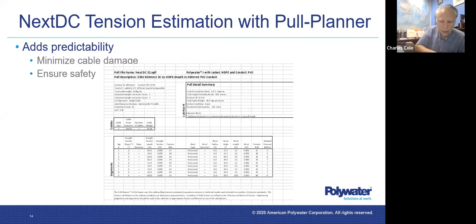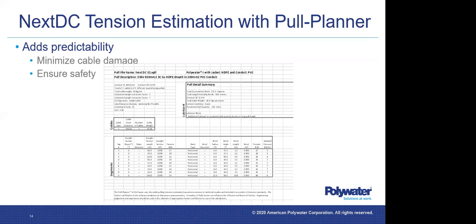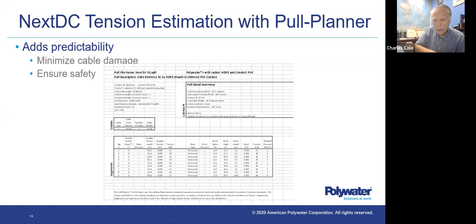One of the constraints of this particular installation was that they had to do it very quickly. The data center where these cables were being pulled to was in a busy business sector of Sydney, Australia. So they had to pull all three of these cables, 950 meters, in one night, in a period of about 6 to 8 hours.